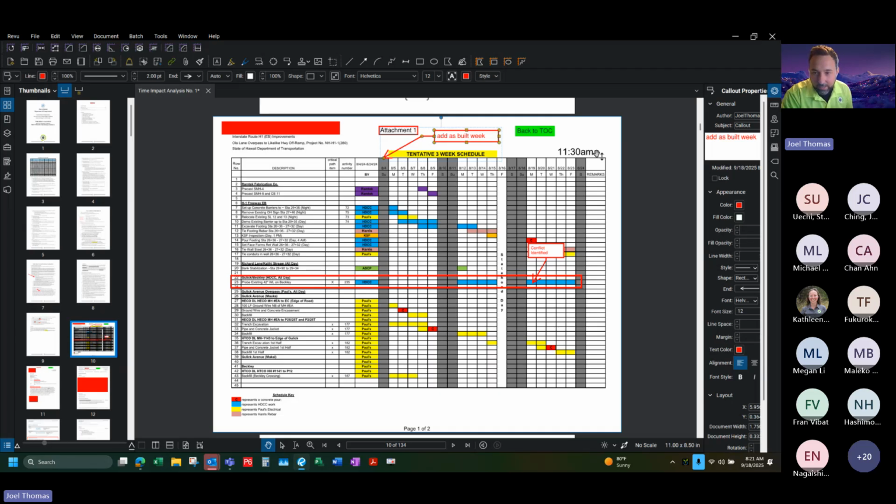And then number 2 you had was maintain a spreadsheet with columns: delay description or issue, impact start date, impact end date, contractor notification yes/no, associated RFI or field order. Yeah, I think those are good ideas. That's another thing you could do, set up a spreadsheet that keeps track of all of those schedule related issues. Whatever you think would be the best way to track these things, go at it. That way actually does sound pretty good. I like that too.